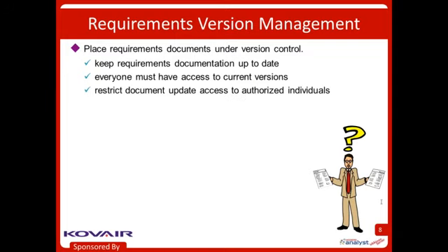One way we can try to do this is to make sure that only certain people, authorized people, typically a business analyst, can update the requirements. So everybody has read access to it, but only certain people have read-write access. And this is one problem I have with using wikis for requirements documents, depending on if you've set any permissions. If everybody can change a wiki, then basically that's an invitation for chaos, not for making sure that everybody is being clearly read in and communicated on the changes that are made.